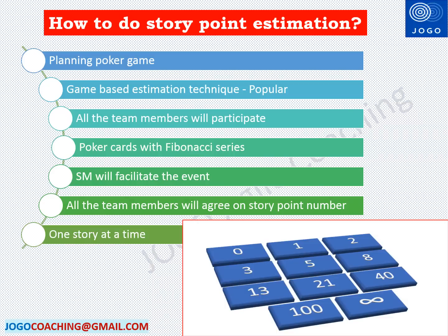Team members will be given a poker card set which will have different numbers in each card. Fibonacci series numbers will be mentioned in each card. You can see the sample poker card with the numbers on the screen. Each team member will select a card to tell about their estimation for the user story. Team members will discuss and agree on the story point for each user story.